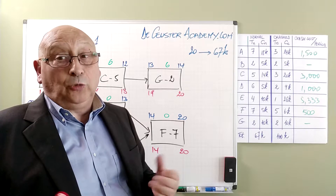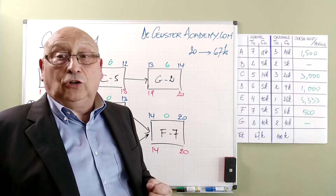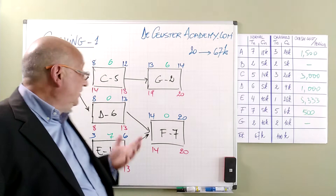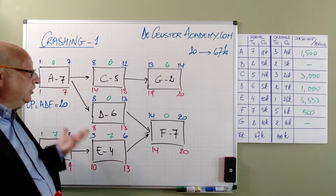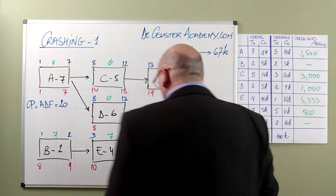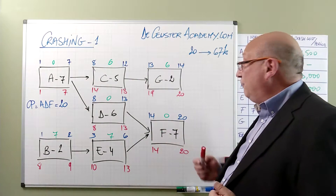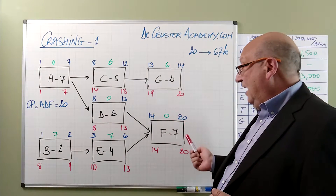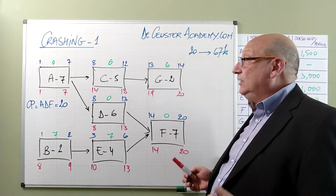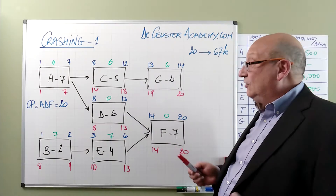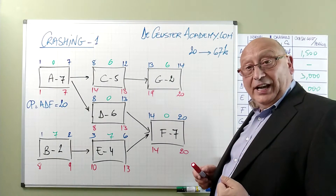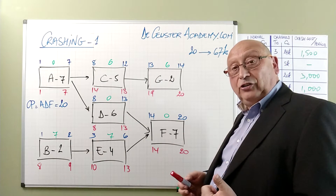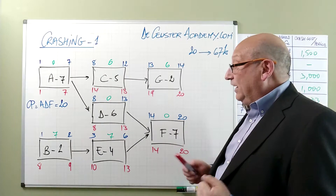We need to see which of those activities are on the critical path before we start crashing. This is the network diagram we are considering. Our project is composed of activities A to G, with three paths: ACG, ADF, and BEF. When we do the calculations, we find that the critical path is ADF with a duration of 20 periods. The total cost of the project without crashing is 67K.